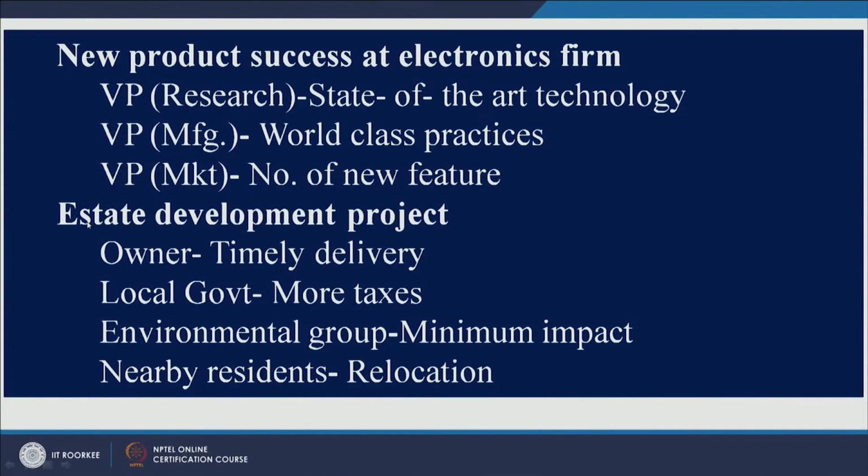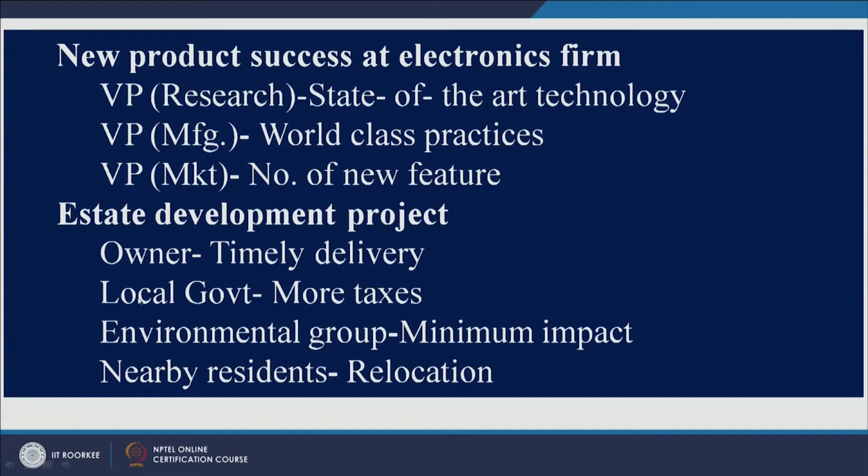Let us look at another example of having different stakeholders. Let us say an estate development project. Let us say I want to buy a house. Being the owner of the house, I have given some money to the builder, but at the end of the day my objective is timely delivery. I want my house at a particular time, right. The state government, the local government, the municipal corporation and so on, they want more and more taxes from the people who are residing in that particular area.